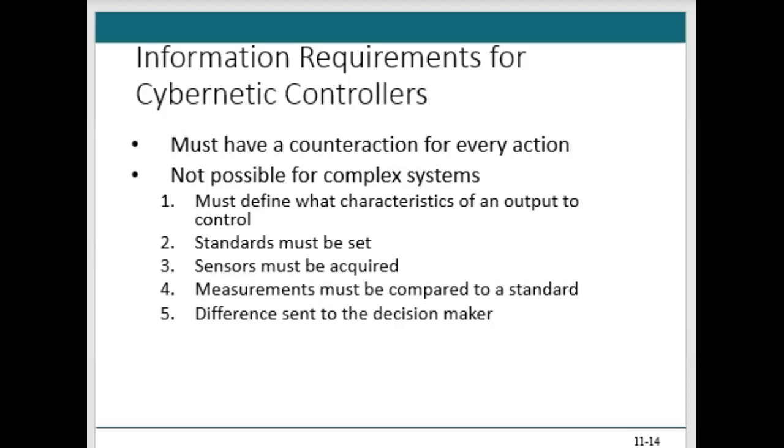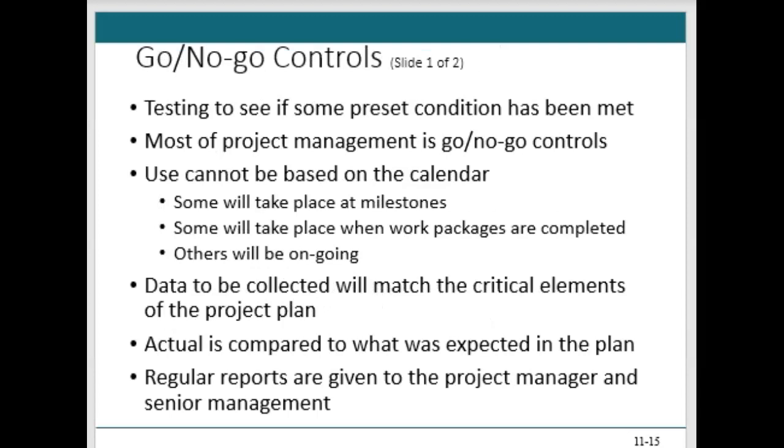Perhaps the most difficult task in creating a cybernetic control is setting the actual standards that we're going to be dealing with. And these standards are a common subject for negotiation between you and the various stakeholders, right? So in order to implement all of this, we're going to use the critical ratio or earned value analysis, a couple of tools we can use to act as our cybernetic controls. And both can be used in that way. Cost performance index, schedule performance index are just two examples, and we discussed those both back in the cost lesson a few weeks ago.